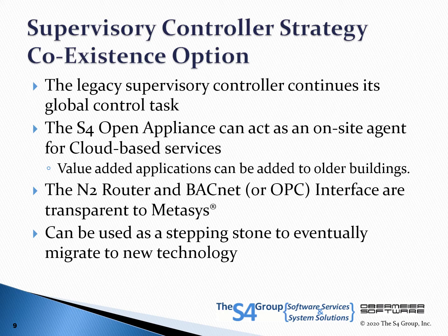Metasys head ends are aging and could fail at any time. As with the field devices, Metasys Supervisory Controllers have been workhorses. However, as they age, you need to look at them as a single point of failure. If the Metasys Supervisory Controller fails, you will lose all the services it is providing. Therefore, it is wise to use this option as part of your overall transition strategy, not as a long-term solution.